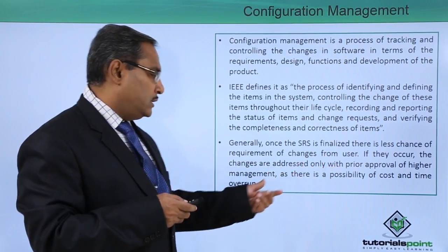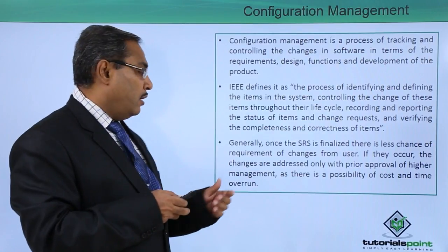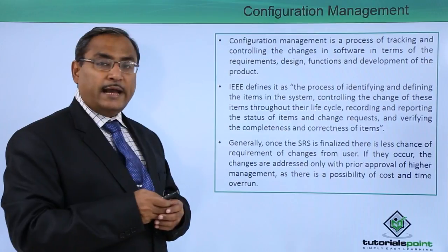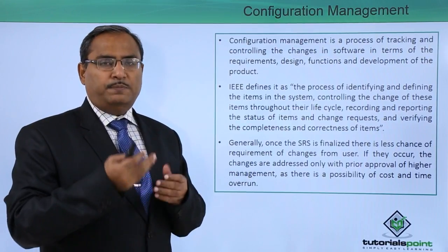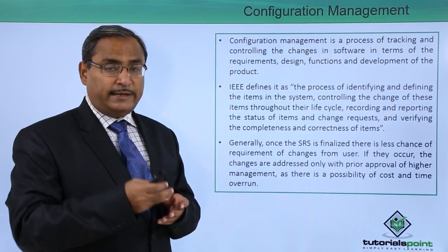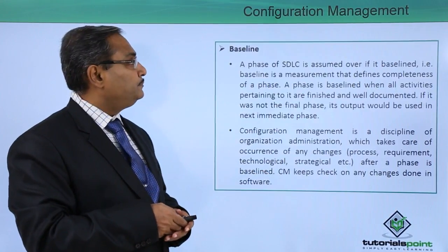If they occur, the changes are addressed only with prior approval of higher management, as there is a possibility of cost and time overrun. It may go beyond the budget, or we can miss the deadline if we want to implement these later requirements.